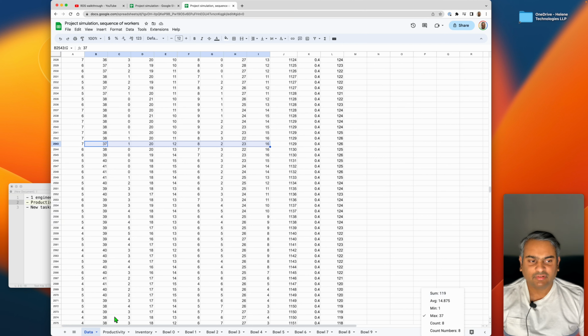So assume different stages in a company. So first, let's say a marketer identifies features. That goes from 0 to 1. Then maybe a PM. Then maybe a UX designer. Then maybe a back-end engineer. Then maybe a front-end engineer. Then maybe a mobile engineer. Then DevOps. Then QA. Then it's launched. So those are the sequence.